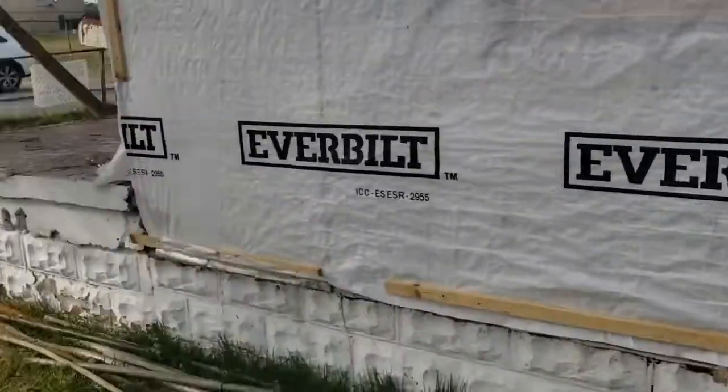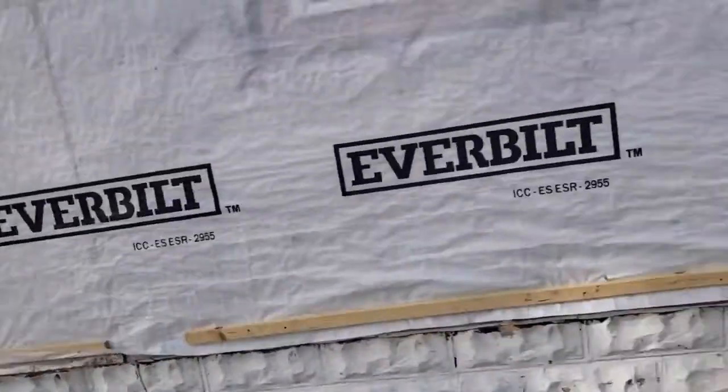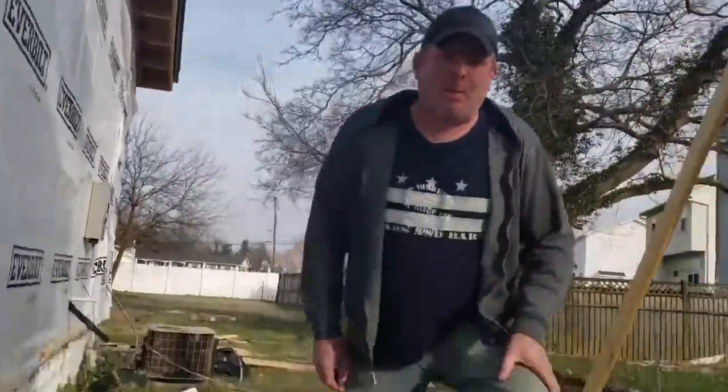Thank God. So what our plumber's concern was, we actually just ordered on Thursday Miss Utility to mark the entire property, because originally they do have gas service, but we don't know where it's coming in. We haven't found a meter. We found a water meter, but we're having them come out. It's a free service. You call that 800 number, and they come out for every utility in the area. The electric has already contacted us and said it's no problem.